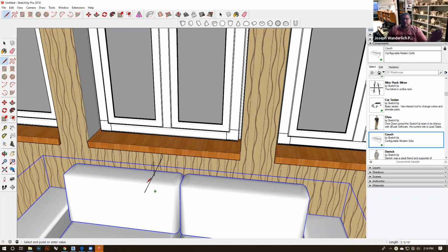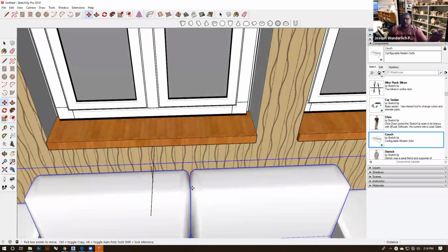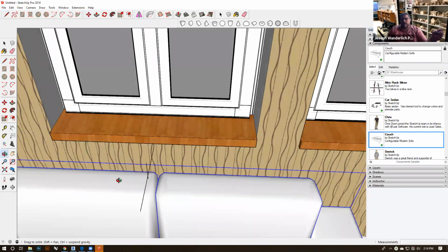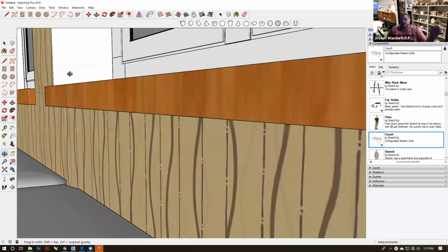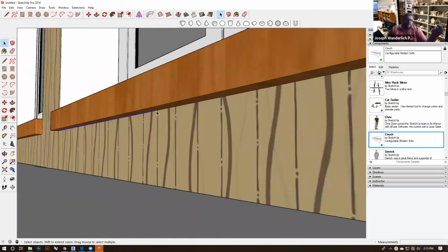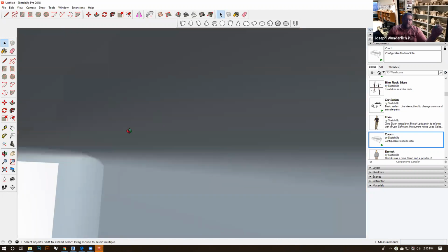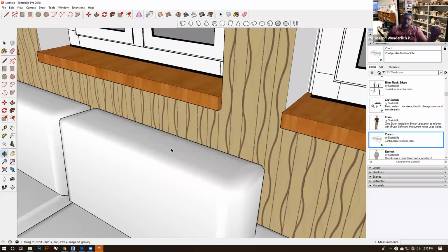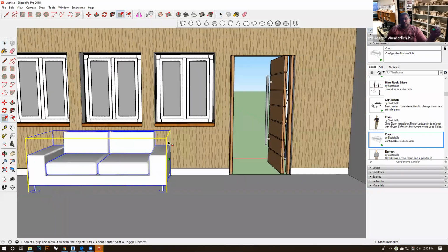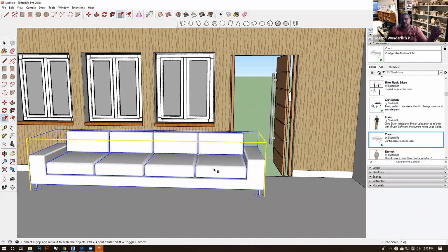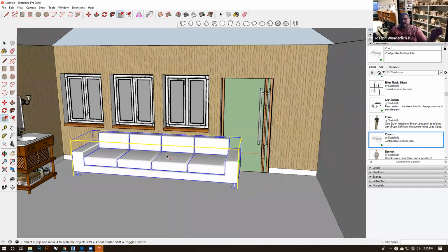the BIM system is key, having all that data that tells you what is real. And then there's specifications, which we're not talking about in here. Some of you have seen that before. And that could be a huge, giant 1,000-page thing. Those of you who went with me on the field trip to the Sports Fitness and Wellness Center trailer, and we looked at the working drawings, I believe there were 2 volumes, each 1,000 pages of specifications, words and materials, details, and if alternatives are going to be approved, they need to meet certain ASTM standards.